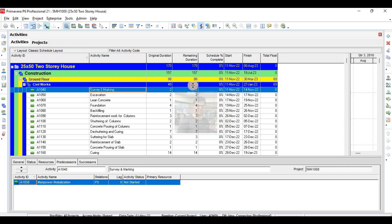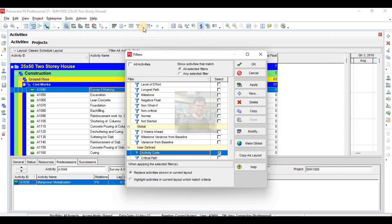Now we will come to filtering your project. For example, my client has asked me to send him a schedule of two weeks only — a two-week look-ahead schedule. In a two-week look-ahead schedule, those activities will be included which started before today but are not yet finished, and which will start after today and before two weeks from today.